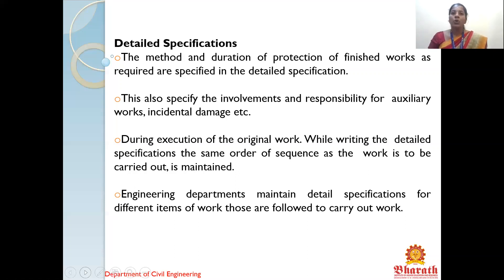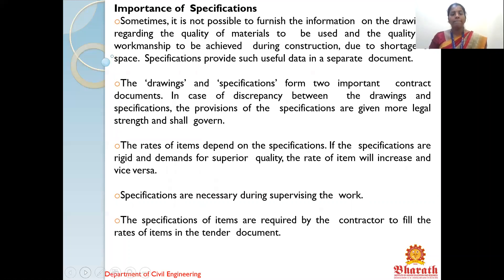In the execution of a construction project, we start from site clearance to the final closing phase, and in the same order the detailed specification should be written so that it can be checked and maintained easily. Engineering departments maintain detailed specifications for different items of work. Now we are going to see why specification is most important. Sometimes it is not possible to furnish all the information on the drawing regarding the quality of materials and workmanship due to shortage of space — specification provides such useful data in a separate document.